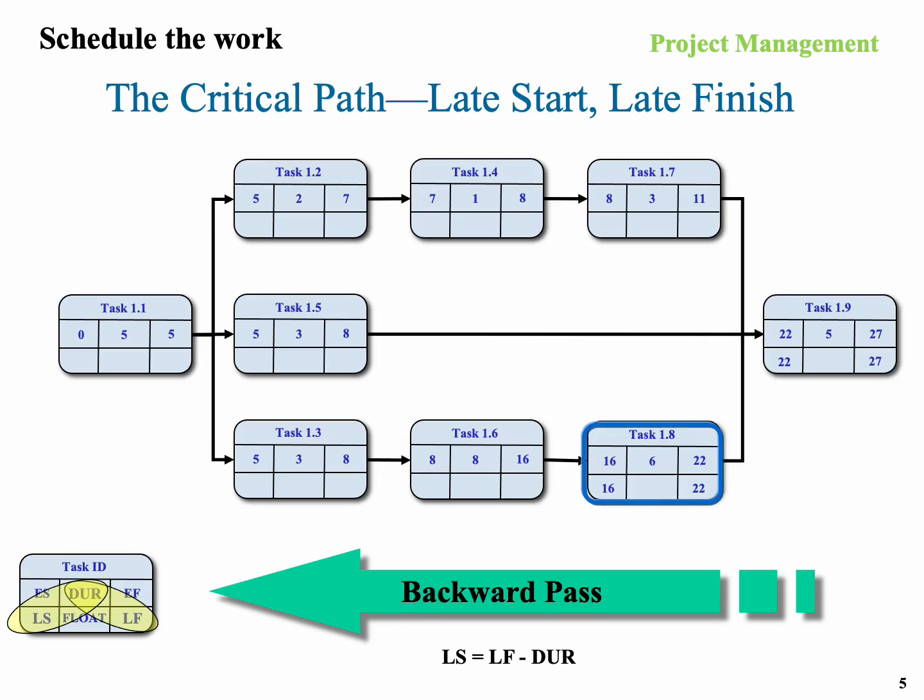Now I'll just run through these particular tasks going backwards, and you can see where we get the numbers from and how it's calculated. Pretty straightforward, pretty easy to do, simple math. I'm on 1.2 right now. And ultimately, we get to the end of it, going backwards to task 1.1, and we take 5 away from 5 equals 0. So there we have our backward pass.